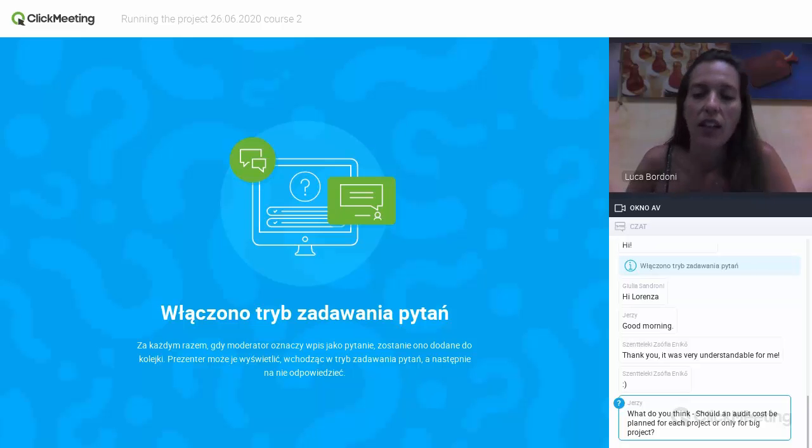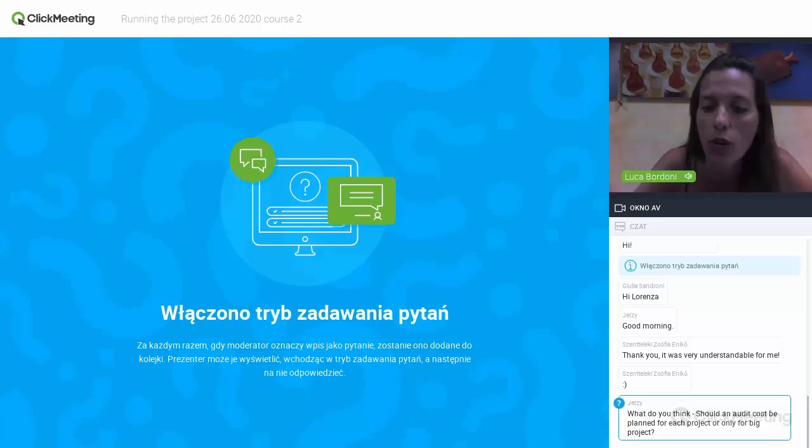So the question is, should an audit cost be planned for each project? Generally, an audit will arrive when the authority decides. So you have to imagine that an audit may arrive even 5 years after your project, and also for small projects. In our experience, we have audits on each kind of project. They send you an email, a document asking for an audit, there is a decision together about the date of the audit, and the revisor arrives and can check everything.